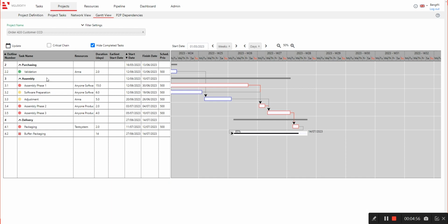So here is a relative urgency for these tasks, the red ones, to really focus and finish, whereas there is some slack on these others. If they are delayed, it won't hurt the delivery date, so therefore they have a different color. This means that even though this project is red, we don't have to be in a hurry with all the tasks. Some have some slack.